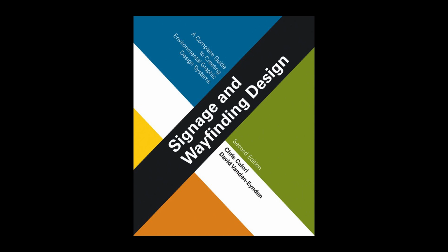The contract rep forwards the completed punch list, often accompanied by a memo summarizing general comments, to the fabricator to make any necessary corrections to the defective signs. On a large signage program, the punch list inspection can be very time-consuming and exhausting. So it's important to point out that the design budget may not accommodate the EG designer performing an exhaustive inspection of each and every sign.